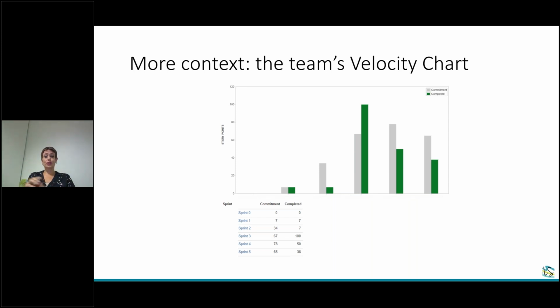None of those 20 story points were actually on stories that we planned at the beginning of the sprint. No idea what velocity is, basically zero predictability. This is a historical velocity chart for the past several sprints, if you're not familiar with these. At the end of sprint 5, we're looking back at this chart going, we have no idea what this team is capable of doing. Even with a QA environment in place, we would have no idea because it's all over the place.